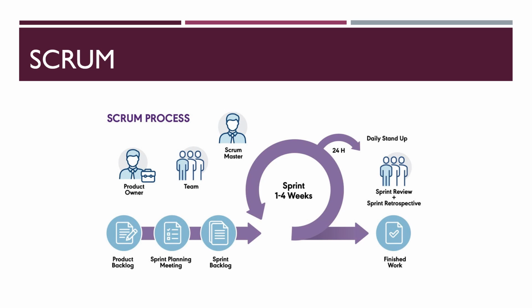Coming to the first phase, product backlog creation: the product owner works with the Scrum team to prioritize items based on customer priority, feedback urgency, difficulty of implementation, and relationship between the items. Based on these criteria, the product owner will index the user stories, and various items are included in the backlog, like features, bugs and defects. Information acquisition and technical work are also included in the product backlog.